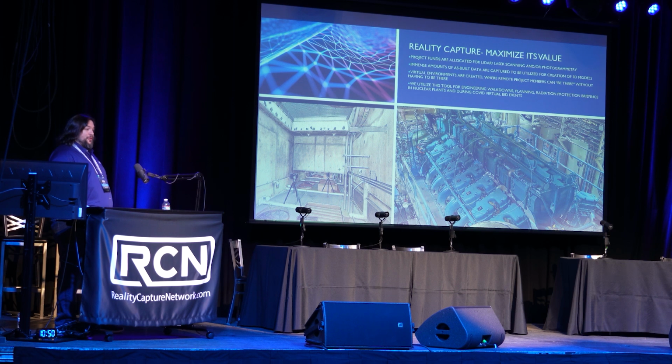And they're like, well, we have to replace these now, and it's going to be extremely difficult to even get these out. This was at the very beginning of COVID. We weren't allowing vendors on site. We're like, how are we going to be able to actually bring the vendors in for vendor bid events, walk down the actual project? So we went in, we actually scanned and did limited modeling of the actual environment. Then we did basically a virtual Teams meeting and virtually took them into the space.